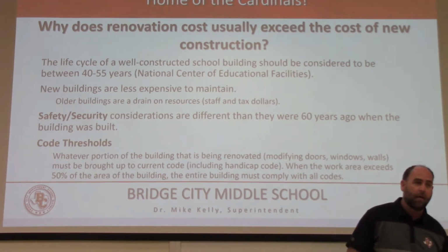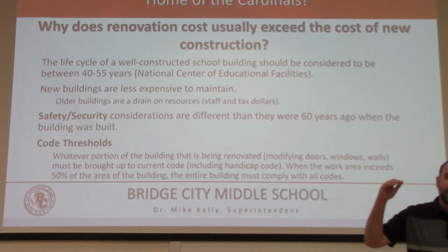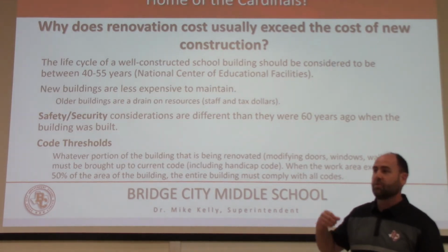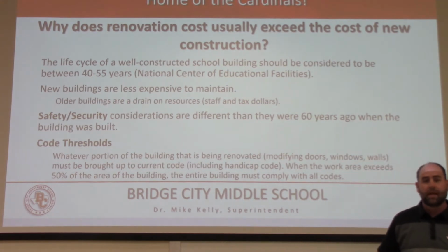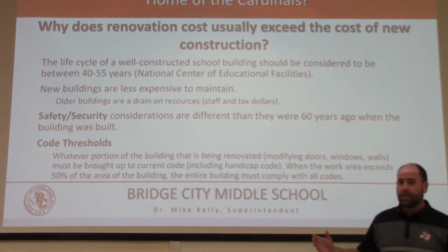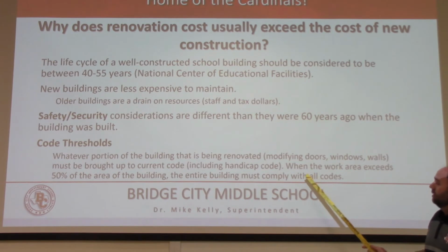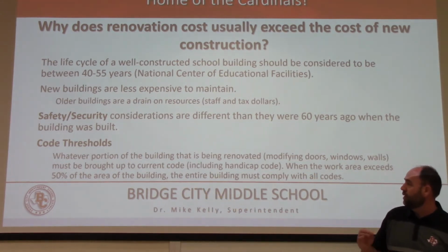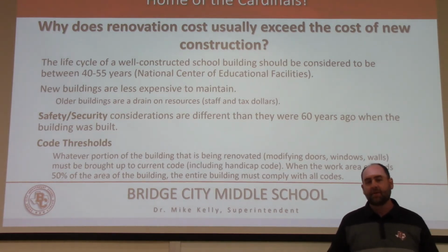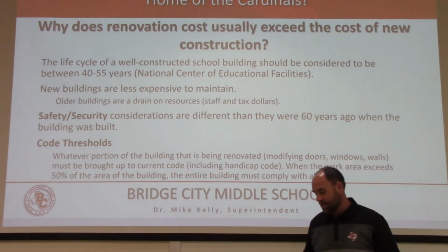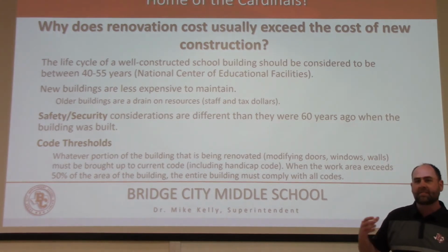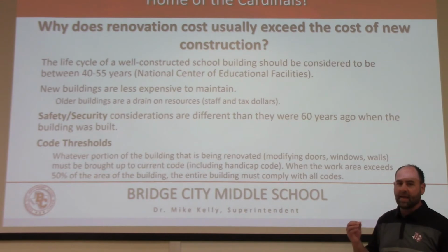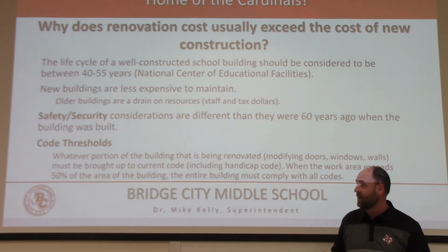And if you think about all those things I listed earlier, from the media center to the cafeteria to the science labs to functional academics, and there were others, guys, that is for sure more than 50% of the building. Whatever portion of the building is being renovated, again, this has nothing to do with a dollar amount. I've seen that people think it has to do with how much money you spend. It has nothing to do with how much money you spend. It has to do with the area or the square footage that you're renovating.